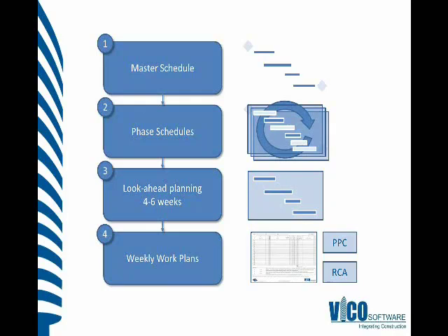And then from each of those look-aheads, we're taking the weekly chunks of activities that we're trying to achieve and then breaking them down into a table of assignments in a very social process of capturing it by pen and paper in a meeting room around a table: how we're going to carry out items that will mean that we will achieve the plan, and then marking off whether we have achieved each one of those, rating the percent complete, and then doing root cause analysis for any of those deviations. So the process is pretty simple.